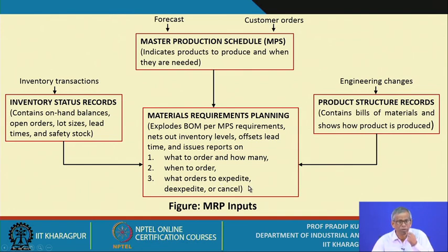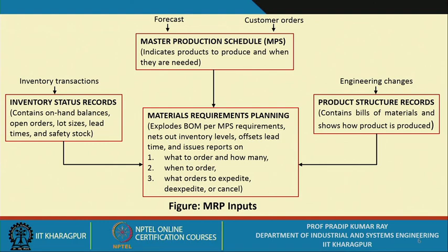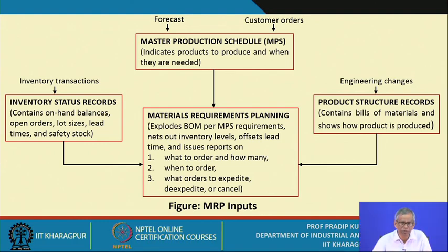Suppose the remaining lead time is just 1 day or 2 days, and for the last 15 days there is hardly any response, you are not getting any orders. So you need to go for expediting the purchase orders. Many a time you go for routine follow up, and in certain cases, for an important project or important items, you go for field expediting.